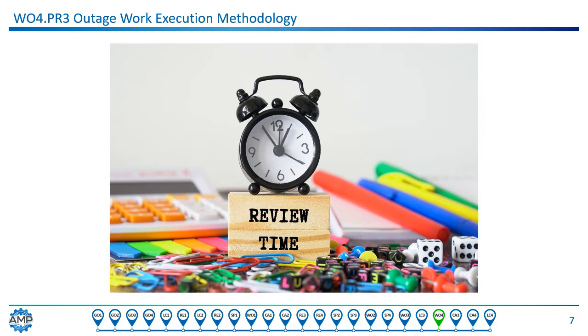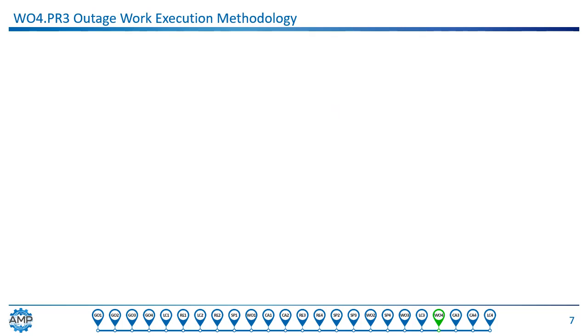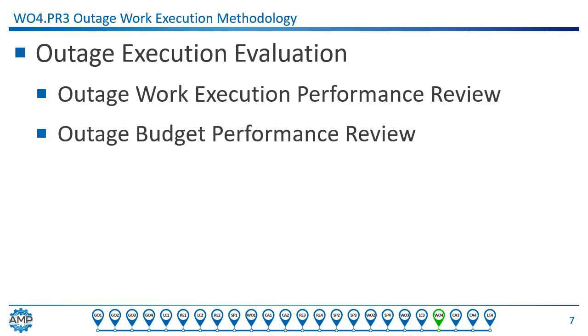Generally, the post-outage review considers two elements. The first is whether quality work was accomplished on schedule, and the other is about whether the forecasted budget for the outage was accurate. This should be a formal review that involves all outage stakeholders, and action items should be tracked to completion in a reasonable time prior to the next shutdown. Incorporation of lessons learned, remedies should be evaluated for effectiveness where possible in subsequent outages. Outcomes should be published, as should wins from improvements.